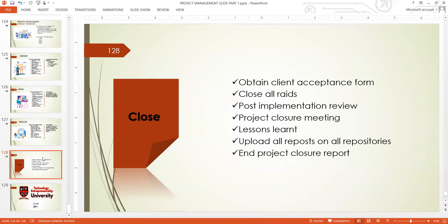Post-implementation review, which we're going to look at in business analysis, is where you review. It's going to be a collective review, with all the project team members and even the stakeholders, to review how you are going to continue to manage that particular product or software going forward. Because you just developed it, and some other people are going to manage it. That's where you have to document how to maintain that particular software. That's what we call the post-implementation review.